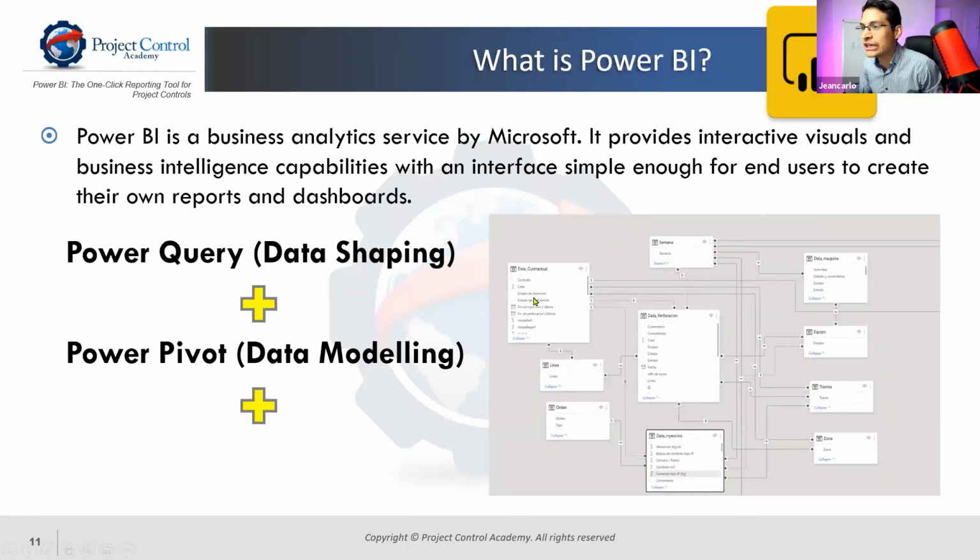That means generating relationships between the different data sets using some sort of coding structure. So basically, if you want to make intelligent visuals from your data, you're going to need to somehow match your data sources using some sort of coding structure that allows us to bring this data together. So if, for example, you have a WBS on the schedule, and then you have control accounts in your cost management section, you need to match them up. You need to map how the control accounts are connected against the WBS that you have on the schedule side of things.